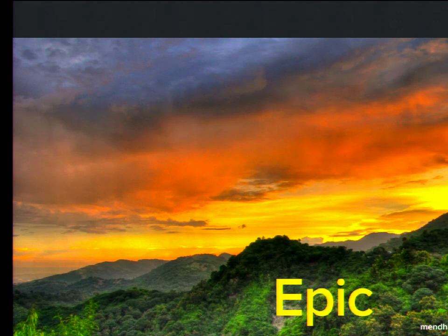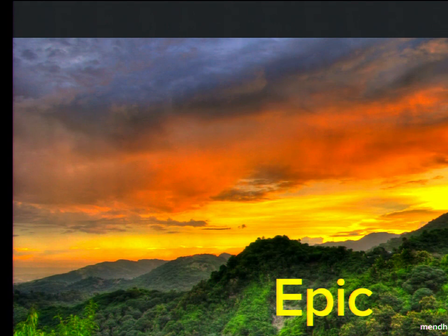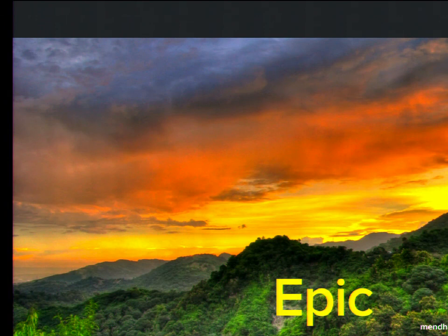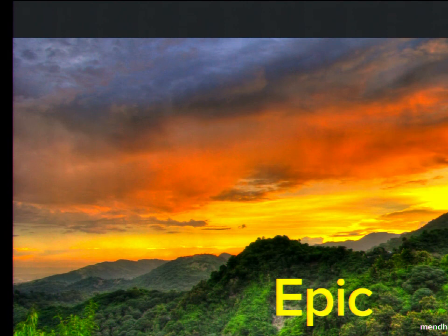An epic is like a really big story — maybe a blog or article — a set of tasks that arc over two or more sprints. At Atten we use epics to generally define a project: our sales people use them to define contract features. We also use them for time tracking — booking time against epics rather than individual tickets, giving me a good sense of how long things take without being so granular that developers feel burdened.